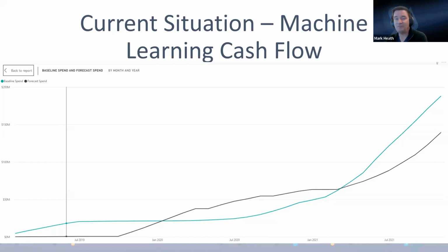And you know that it's going to be very accurate because it's based on the productivity profile of, say, you don't need a lot of projects. We've tested this. You need maybe 5 to 7 projects to get that cash flow. But it's a rules-based system. It's not a machine learning one. It's not a true sort of predictive thing. It's using a rules-based algorithm. We're looking to make that a mutated algorithm where it'll automatically determine the timeline as well.